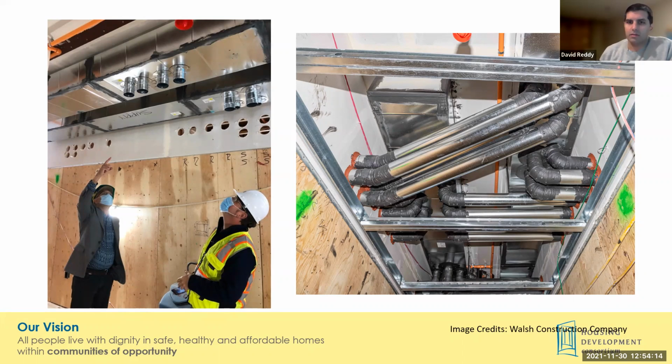And also there was a requirement to have a code alternate approved by the City of Seattle to allow this ductwork to be interpreted to be, quote unquote, outside the condition envelope, or basically just accepting this design, which does not meet the clear letter of the exception in the building code for fire smoke dampers on this design.